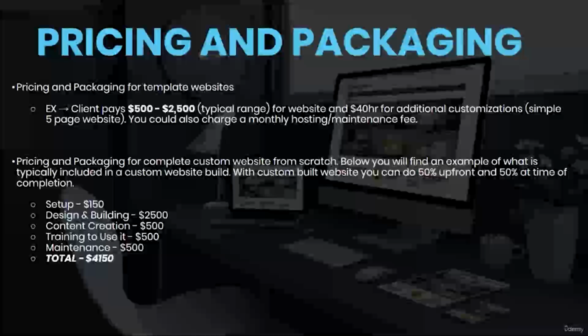And so the pricing and packaging for a complete website from scratch, this is where you're typically doing 50% upfront and then 50% at the completion. And this is typically how the pricing breaks down. You have a setup fee, you have a design and building fee, which is pretty much the entirety of your actual website design and build, because that's where all your time, energy, and resources is going to be going. If not, you're obviously hiring somebody to handle this for you, as far as a developer and a designer.